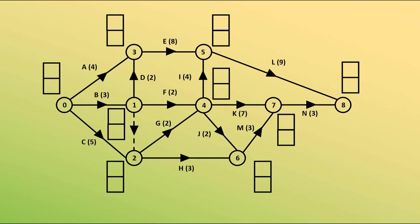In order to work through this I'm going to work through the nodes in numerical order. In an exam situation it's highly likely they will be numbered to help you. However, the real thing is that you need to make sure you are including all activities that feed into a particular node. Doing node 3 before node 1 would be very challenging, because in order to be at node 3, activity A and activity D must both be complete, and we can't know when we're going to do activity D since we haven't worked out anything about node 1.